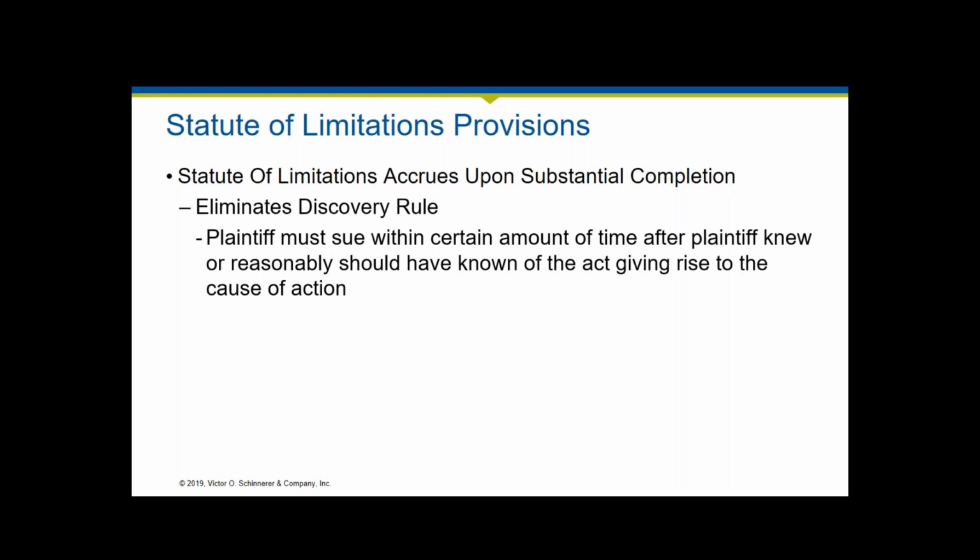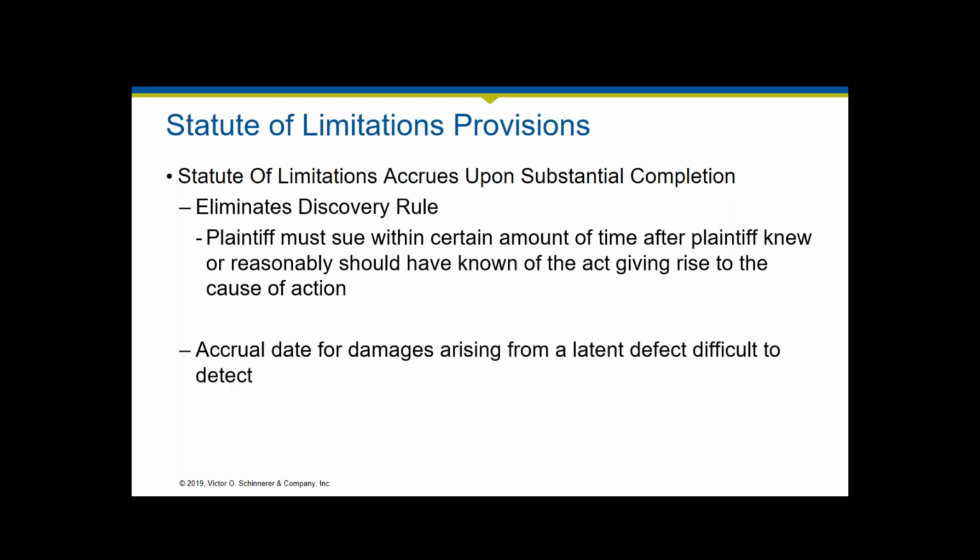So the plaintiff must sue within a certain amount of time, or after the plaintiff knew or reasonably should have known of the act giving rise to the cause of action. That goes away. That's the discovery rule. So substantial completion gives you a date certain as a design firm, knowing that from that point on, the clock starts ticking. If that is indeed in your contract, that is very protective of your interest.